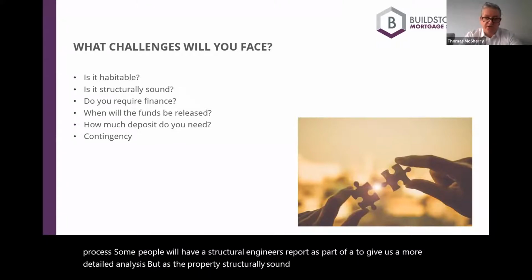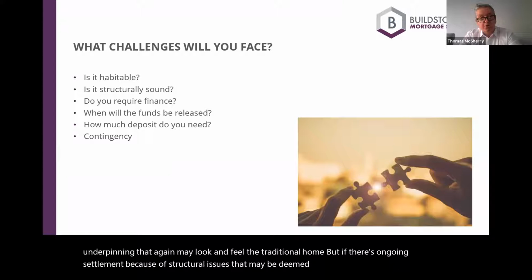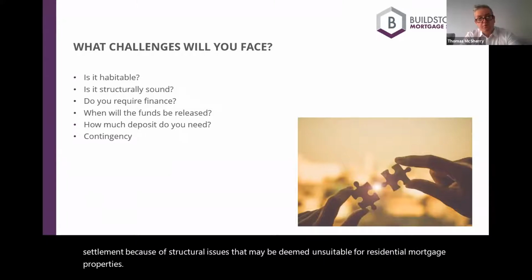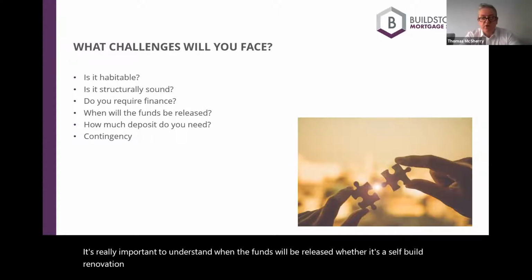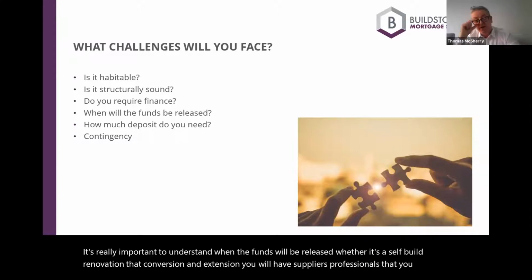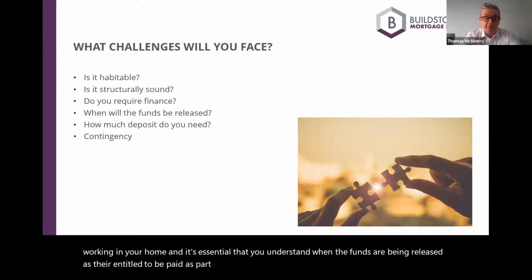There's a requirement for underpinning that, again, may look like a fairly traditional home, but if there's ongoing settlement because of structural issues, it may be deemed unsuitable for residential mortgage purposes. It's really important to understand when the funds will be released. Whether it's a self-build, a renovation, a conversion, an extension, you will have suppliers, professionals that you have working in your home, and it's essential that you understand when the funds are being released because they're entitled to be paid as part of your contractual agreement.